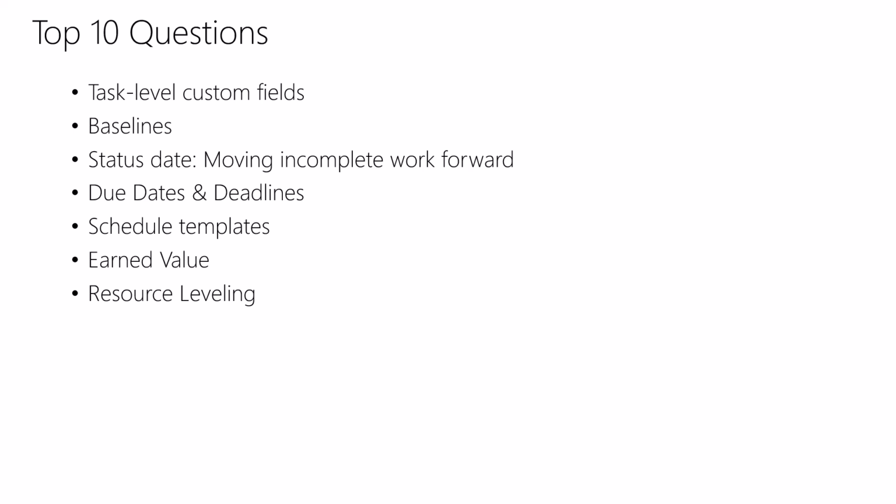Okay. What if I track costs at the task level today in Project? Which option do I go with then? Well, Project Server is where you have the time phase data. So if you want that exact functionality, that's your go-to. However, with most organizations using multiple work management tools, we recommend that you separate the budget, the planned spending, and actuals from the schedule, like we do in the Sensei IQ finance module.